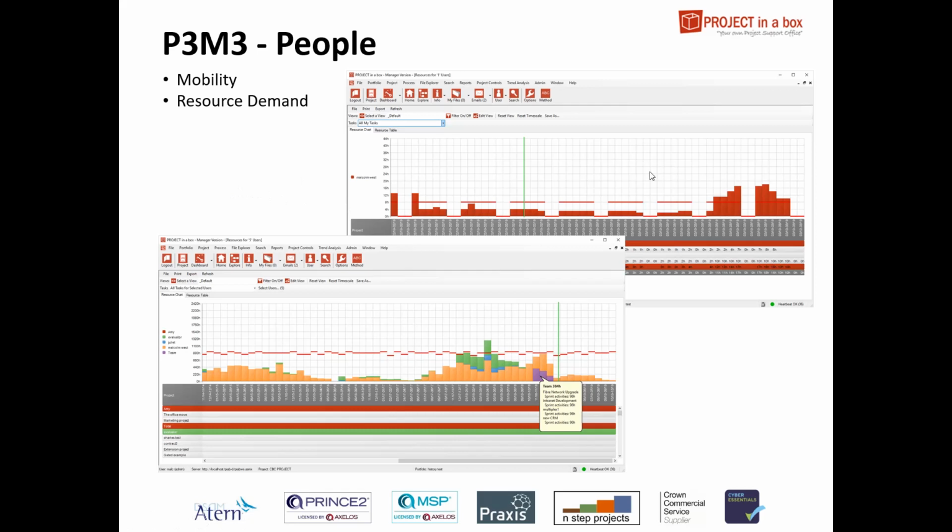Moving beyond that to looking at a group of people. So here in the bottom, we're looking at a group of people. These are a collection of users from the system who all have the same characteristic. So we have this ability of tagging users with information. You can tag users with their typical role, with their skills, with their locations, with other information as well. And then you can search that database, that skill database if you like, when you're doing resource analysis.